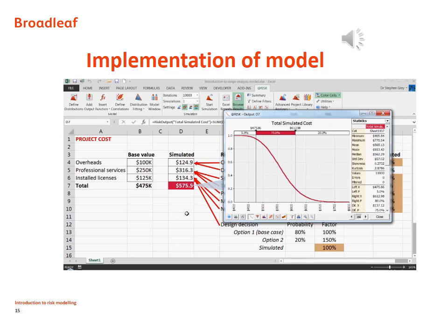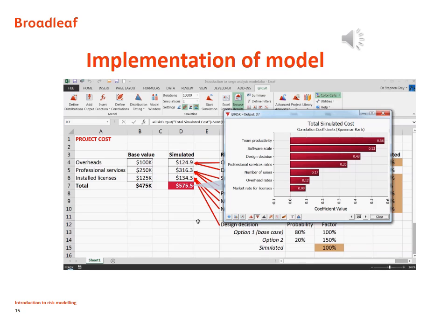There's a lot of information you can get out of this analysis, and one of the very useful pieces of information you can get is to look at the relationship between the uncertainty in the inputs, that's the uncertainty factors here, or risk factors, and the uncertainty in the output. And this shows the extent to which uncertainty in the inputs is driving the spread, that range from 400,000 to $750,000 in the outputs. And you'll see that these top three factors in particular are having a significant effect.